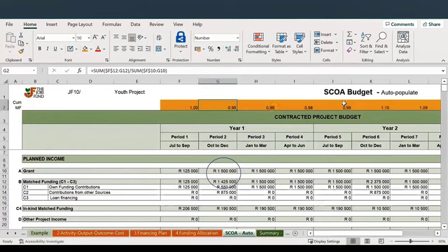anything of these ratios look lower than what is contracted, it means you have to go back to your financing plan and correct it so that we are at least on a contracted basis. That's the least we'll accept. We won't go below that. So in this case, our JFP is a PTY, so they can't go below the 1:1, which is the requirement, and the problem is in this quarter. So they'll have to up their match funding contributions just to make sure that we meet the 1:1 ratio.